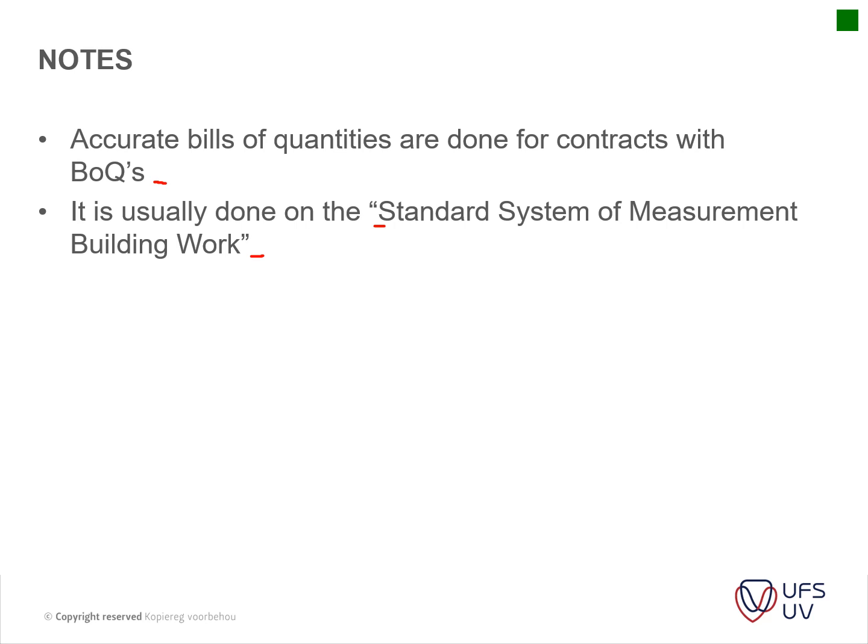Or another thing, for instance, hard rock. If you have excavations, but you find that there is hard rock that has to be either blasted or chipped away or whatever, how do we pay the contractor for that? So it's very important to know. So that's why the standard system has been developed, to say how each and every item will be paid.